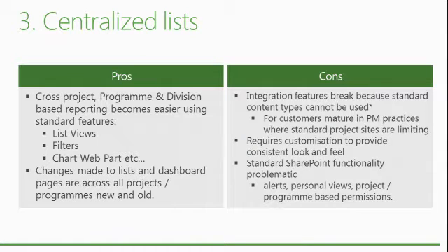As something is created or edited, in your SharePoint Designer workflow you could go off to a list, find out who the project manager is, and find out maybe what an AD group is, and then permission the item individually, which gives you at least a level of control over who can see what data. But of course, we're now talking about a completely different permission model to Project Server. So you're now maintaining two permission models. There are some heavy gains, but you also get some real problems that you've got to sort out.